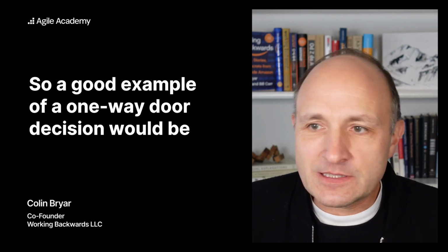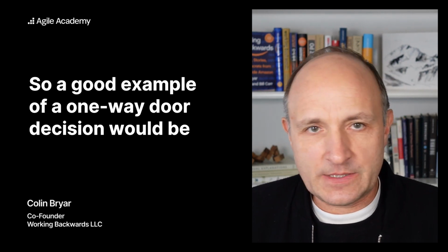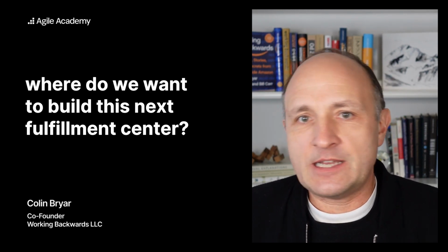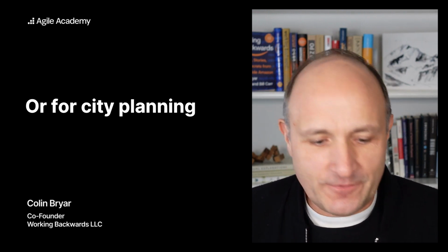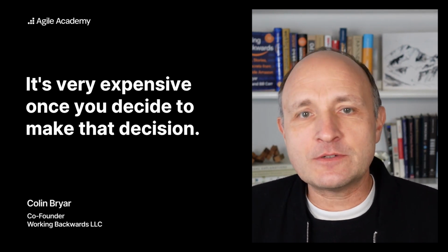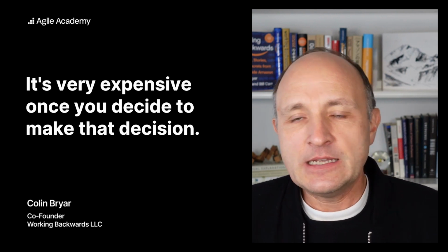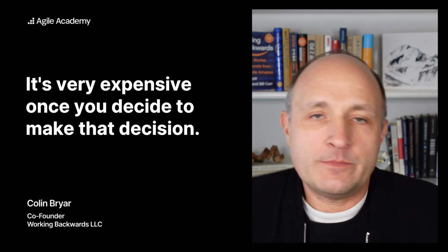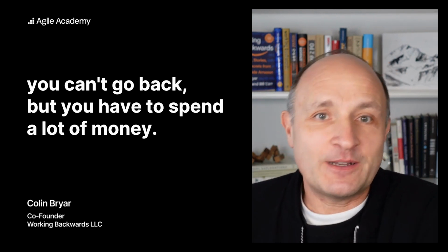A good example of a one-way door decision would be, where do we want to build this next fulfillment center? Or, for city planning or a region, where should the next airport go? Or do we expand a new runway? Once you make that decision, you can go back, but you have to spend a lot of money, or it takes a long time to reverse it.